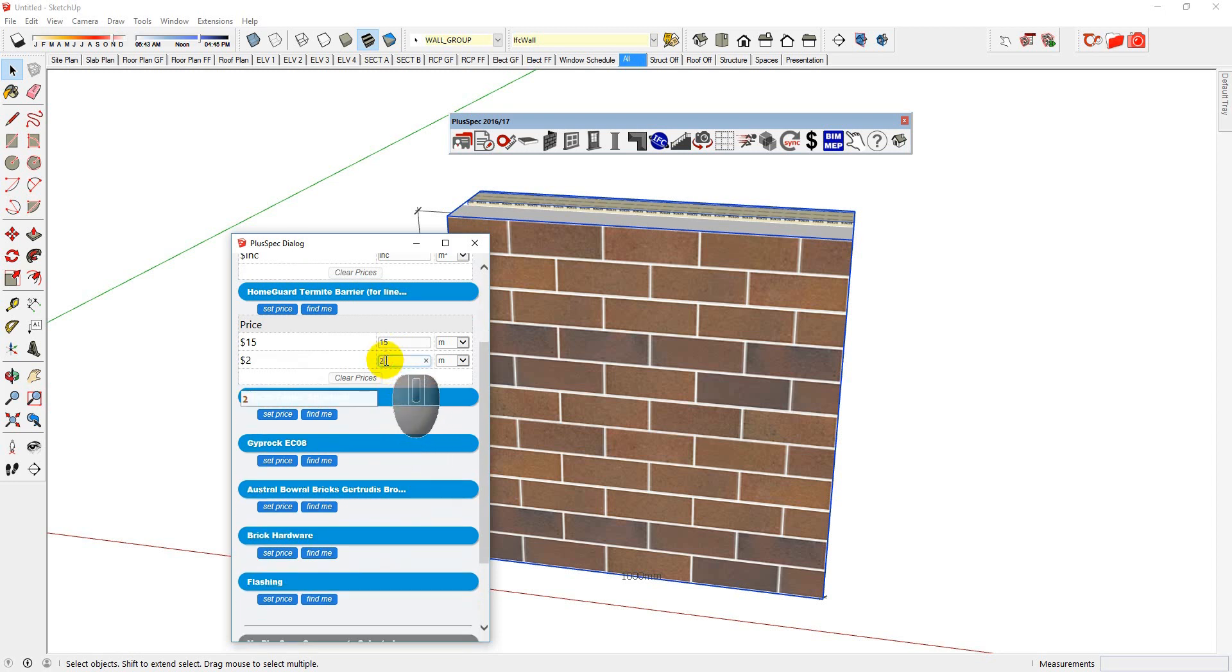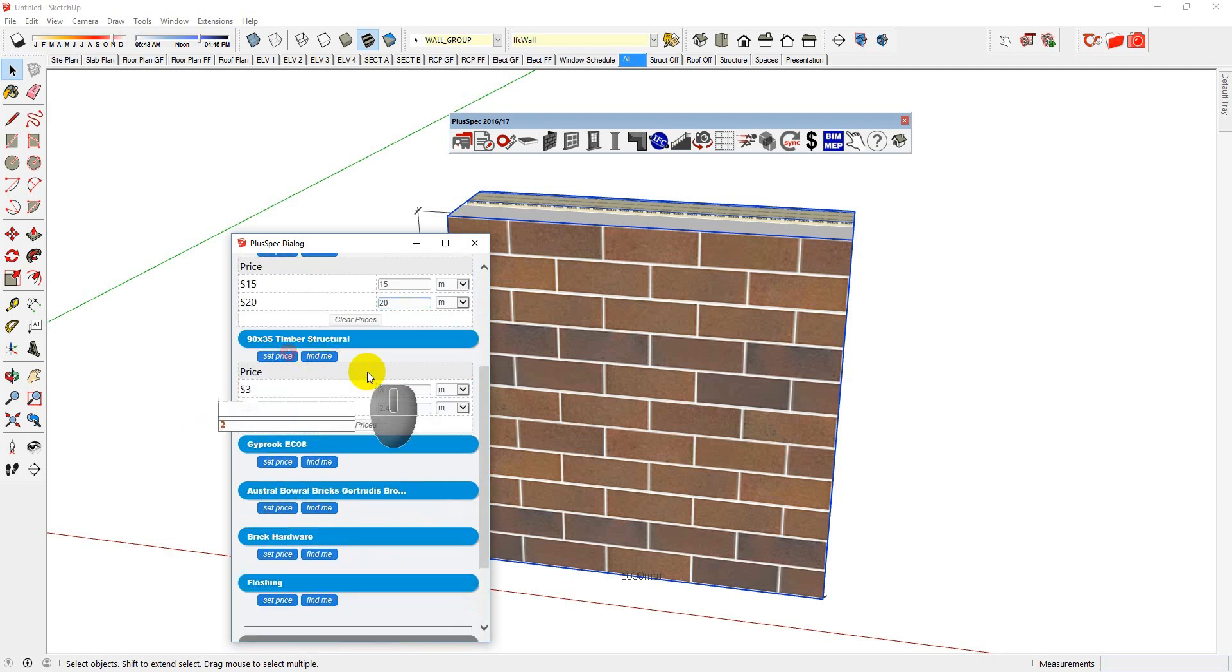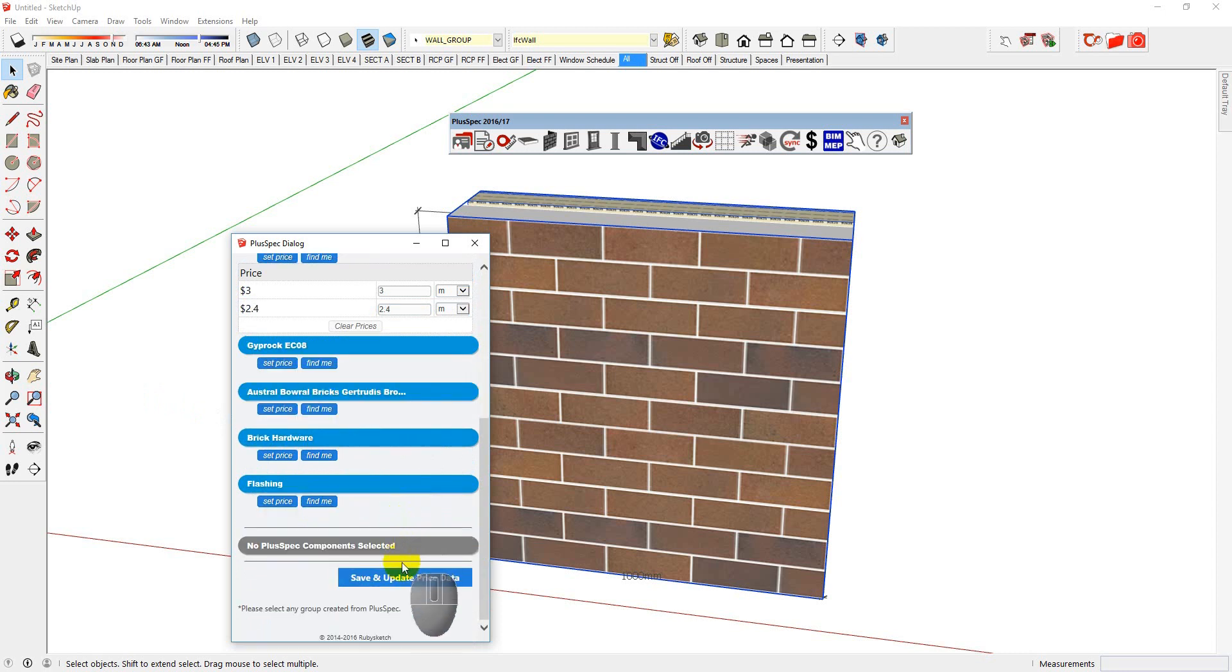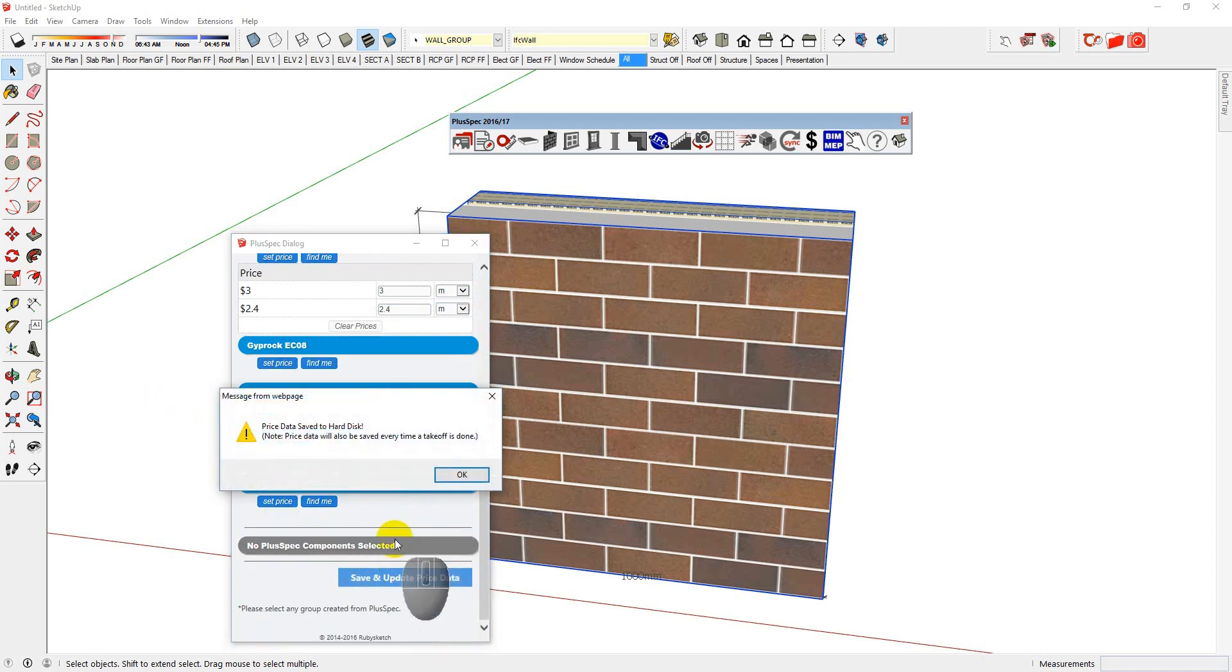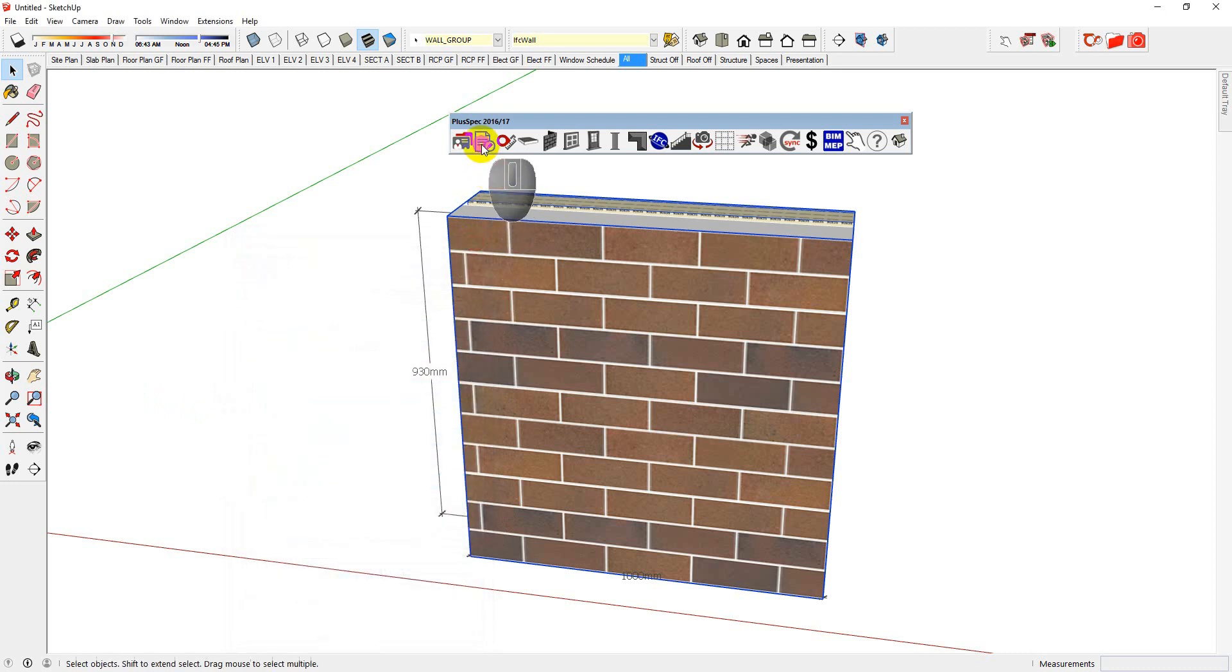So they might charge, say, $20 a meter to install it. Okay. Timber is structural. I have a price in there. And so on. I save them. And I've now updated them to PlusSpec. So next time I use it, it will remember those prices. Let's go back and do a takeoff.